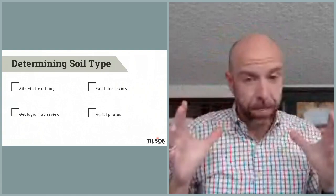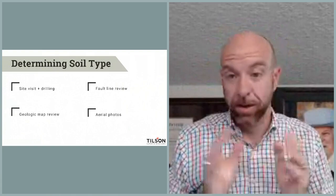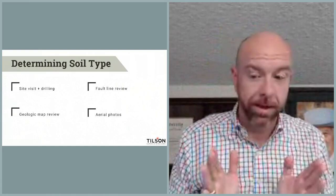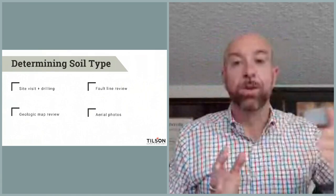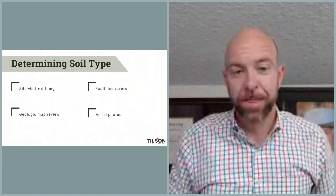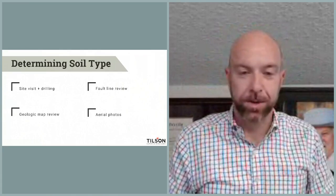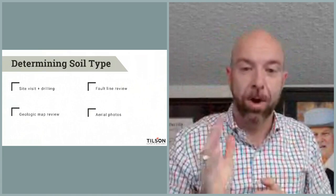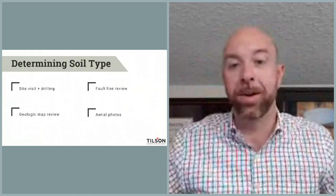They actually pull up USGS, United States Geological Survey, fault line reviews. They look at those. It's not a major thing in our part of the world, but it's a thing. Geologic map review, and then aerial photos. They actually go back and look at old surveillance aerial photos from 20, 30, 50 years ago. And you might be surprised at some of the things that were out there, but they can see if there was an old tank out there, or if there was a fence line out there that cattle used to walk up and down, because with their hooves walking up and down, it's going to be compacted differently than the ground on either side of it.